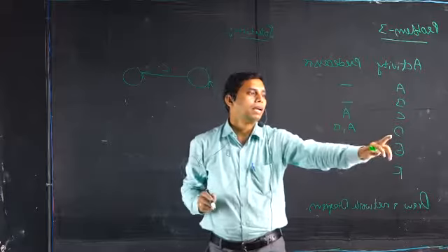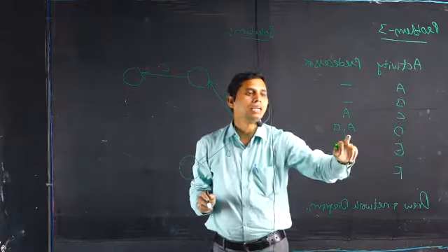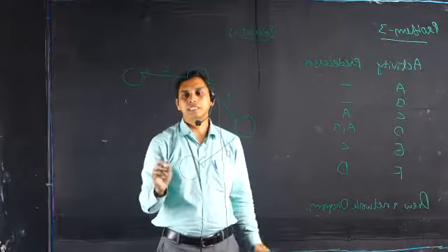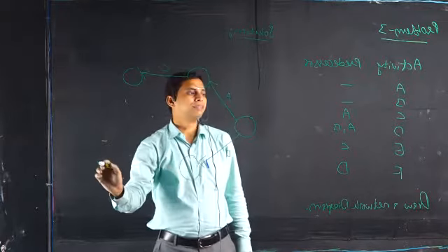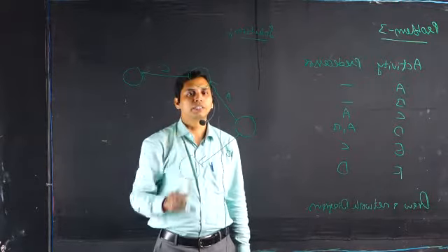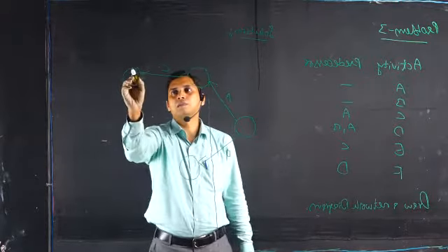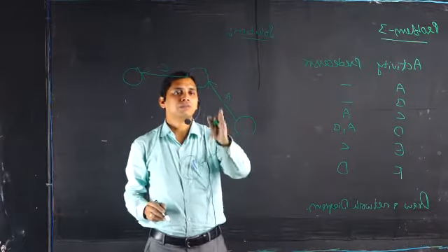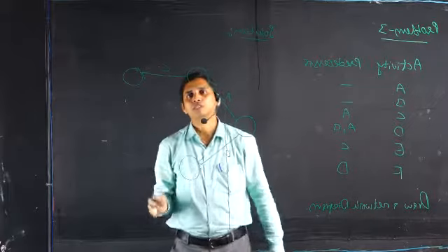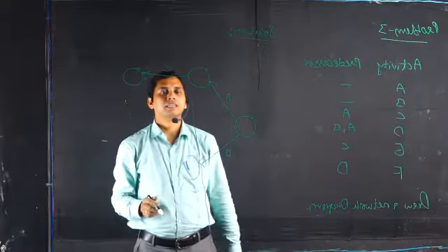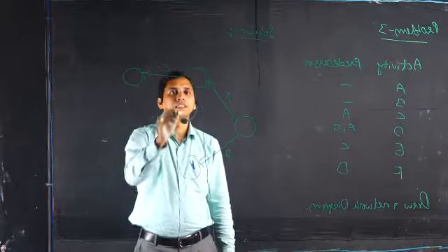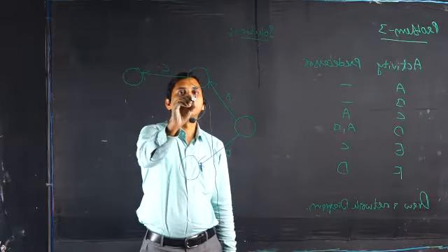That's fine. And then for activity D, the A and B combination is the predecessor. Now for activity D, A and B must be joined together. But in this particular problem, there is no possibility that A and B can be joined directly. So how do we join these two activities? Simply by using a dummy activity.